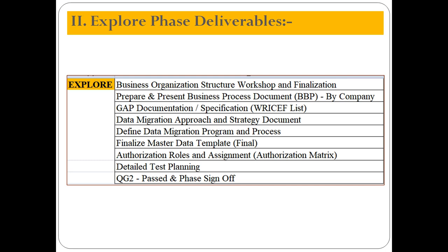Some projects take 6 months, and some projects have taken even 9 months just to complete the blueprint. It goes like that, because if you do not understand the client's requirements, they will not agree. So how are you going to give a solution? They will expect everything. The blueprint is also one of the Bibles for us, and it is one of the legal documents. Once it gets signed off, what information does your blueprint contain? That we will see.